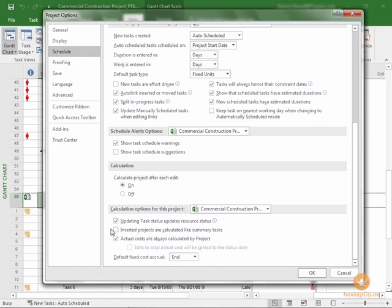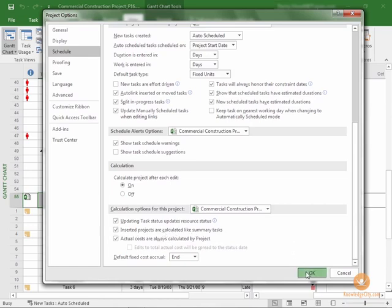The option that is listed as Inserted Projects are calculated like Summary Tasks is not checked. So we would check this if we want to ensure that Microsoft Project views our Inserted subproject as a part of the master project when doing calculations such as Critical Path. We've checked that. We'll select OK.